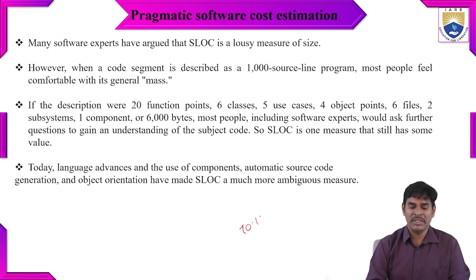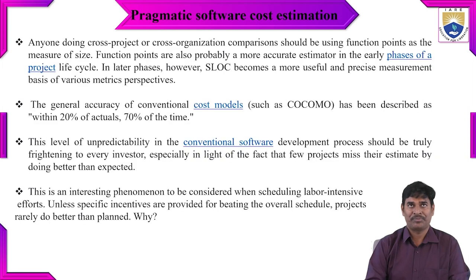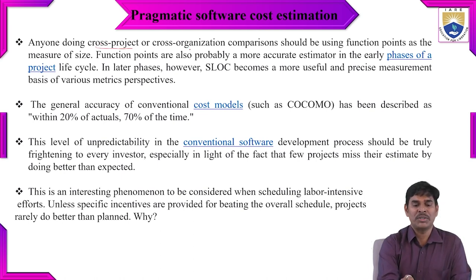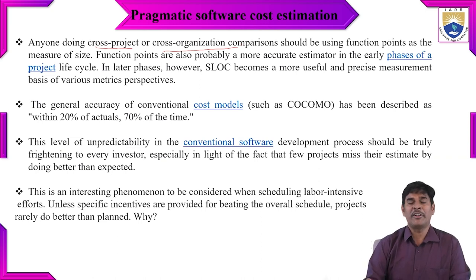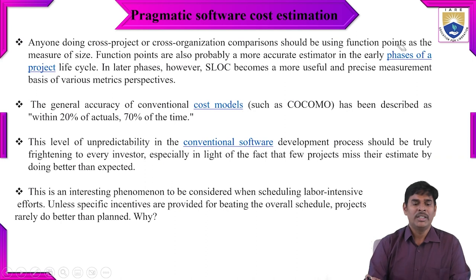In the present era, mainly 70 percent of components are used for software development, and automatic source code generation means that placing a diagram automatically generates source code using object-oriented components. Therefore, SLOC has become a much less precise measurement for cost estimation. Anyone doing cross-project or cross-organization comparisons should be using function points as the measure of size, since projects differ across companies.